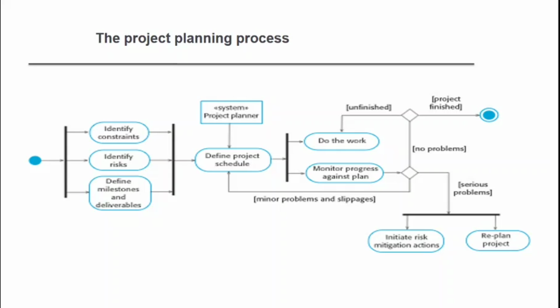Yes, in the do work, monitoring the progress against the plan. If you come across a minor problem after developing a project, there is not that much consideration needed, and it moves in this direction. If there is a serious problem, then initiate the risk process, how to resolve the problem, and replan the project once again. Okay, if there is no problem, then